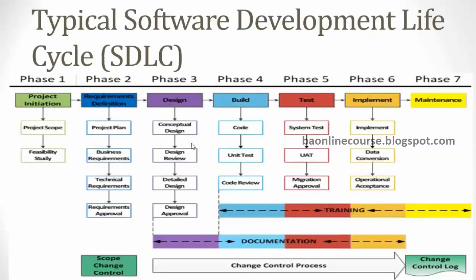Then we looked at the various phases of a SDLC. Primarily, we get involved in phase 1 to identify the projects. Phase 2 during the planning and then capture the detailed requirements. So a BRD would be delivered out of phase 2, right? We won't really get involved in phase 3 and 4. Phase 3 is handled by the technical architect. Phase 4 is by the development team, the programmers. Phase 5 is the testing. We could get involved in this, coordinate the testing with the customer, right? And finally, it could be implemented and maintained. This would be handled by the operations team.